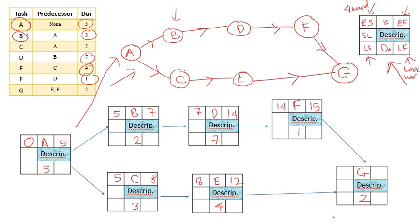Now we have two different values of EF to be used as the ES of G. One is 15, another one is 12. So which one shall we pick? We have to pick the largest one. Okay, so 15 goes here, and this 15 plus 2 is 17. And that is the forward pass.